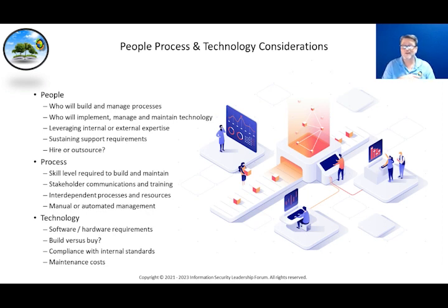Am I going to go get a consultant to help us with this? And some of these other questions will help determine that. So who will implement, manage, and maintain the technology, leveraging internal or external expertise? Sustaining support requirements after it's implemented. Who's going to maintain it? So there's got to be an owner. It's got to be handed off from project to an operational owner. It's an ISO requirement. And then the question is, do I hire or do I outsource?